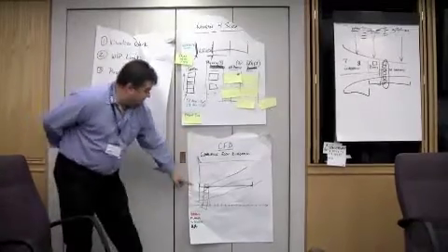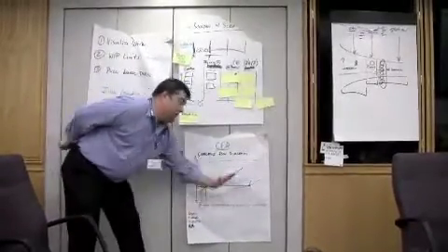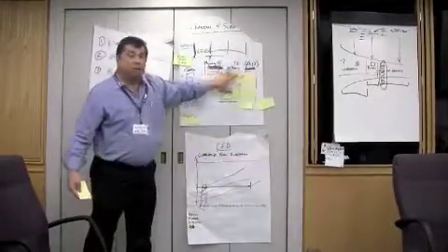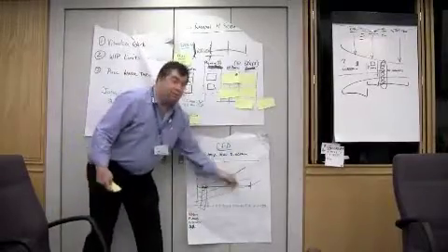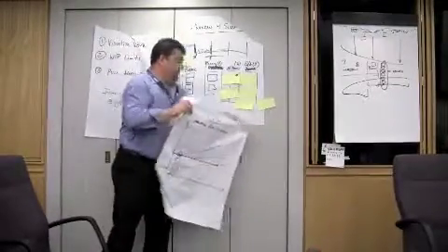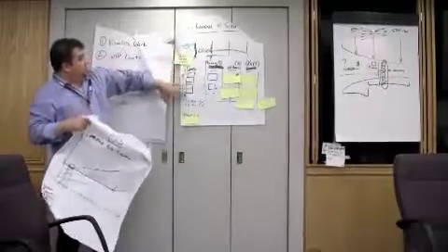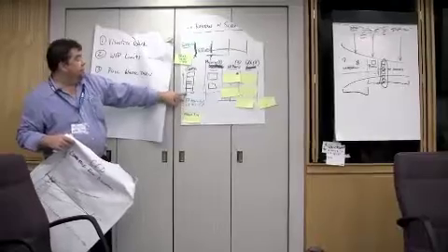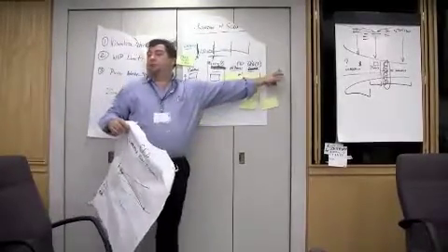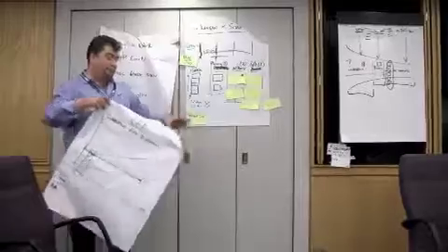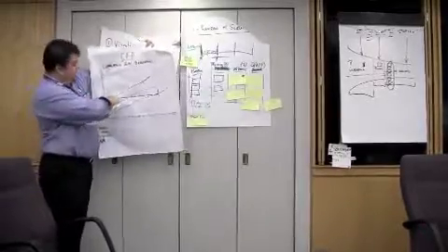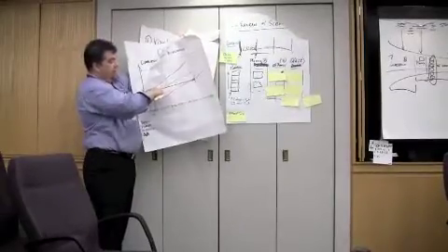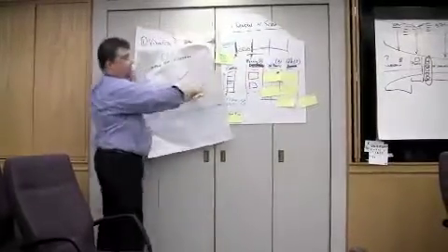And real quickly, over time, we're measuring how many cards are in any one swim lane, one snapshot at a time. So I don't know if you can see this or not. But if I want to project out lead time, the way we do that with Kanban is you drop a card here, we can say, okay, you drop a card there, 12 days before it comes out the other end of the system. Where's that 12 come from? We track our history over time, and it's the horizontal line from when we start a card to the time it crosses all of the swim lanes to the time it's done.